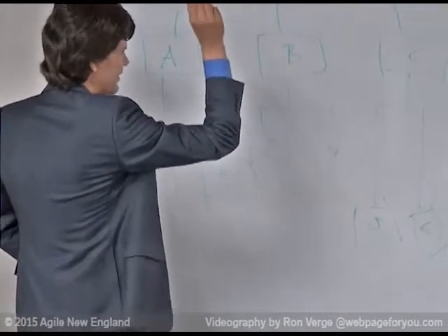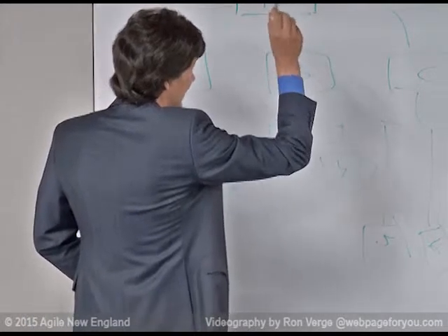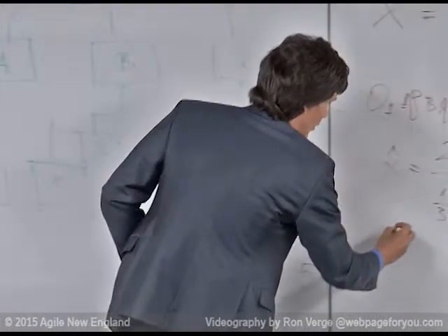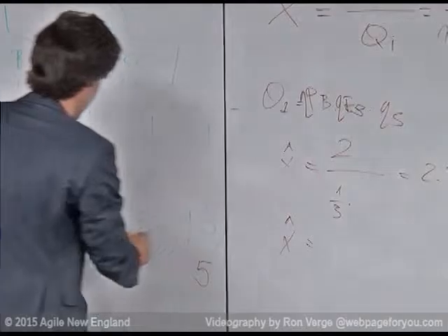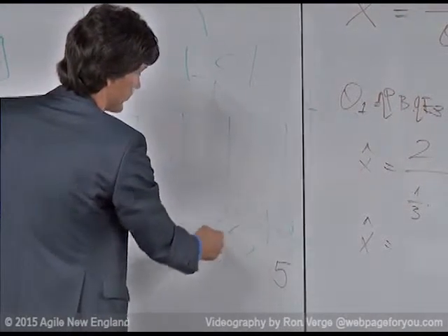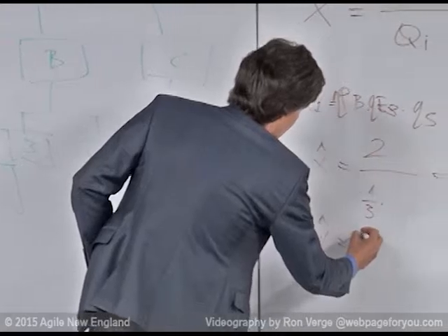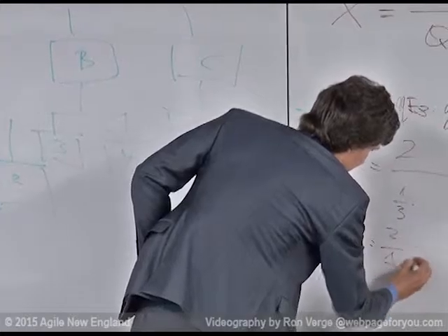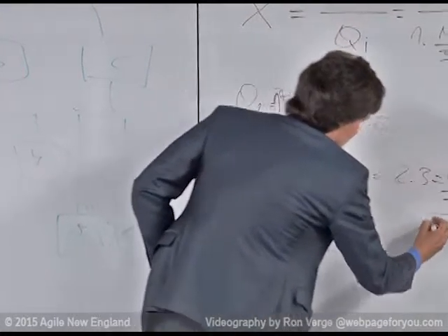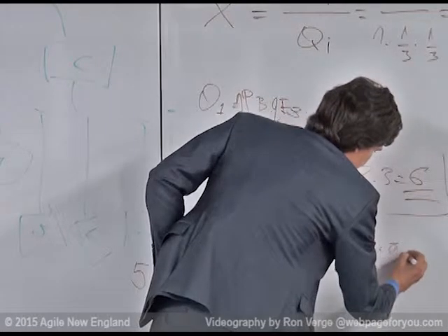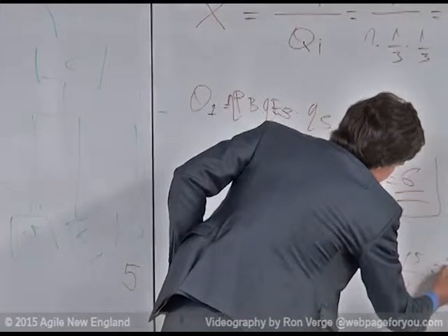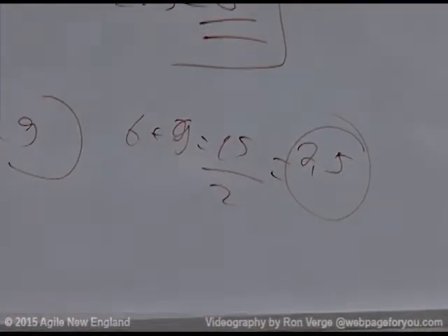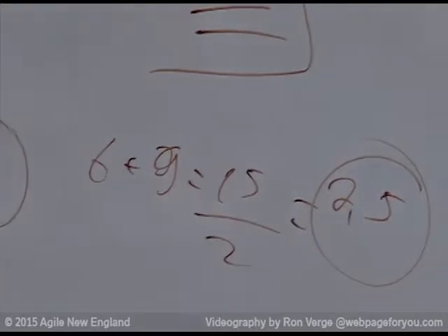If we take at random, let's say, epic C, and then we break it down, then our second estimate will be: epic C has 3 user stories, divided by selection probability, 9. So 6 plus 9. Number of user stories.